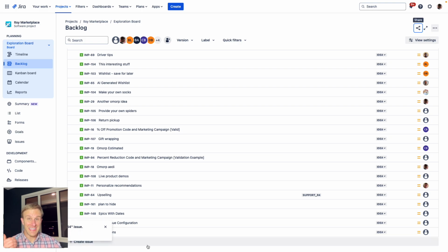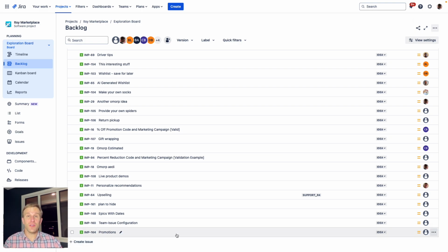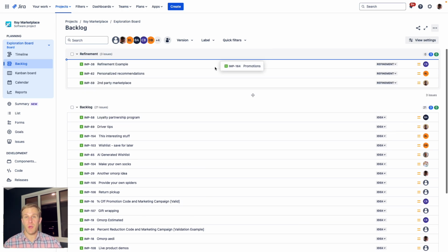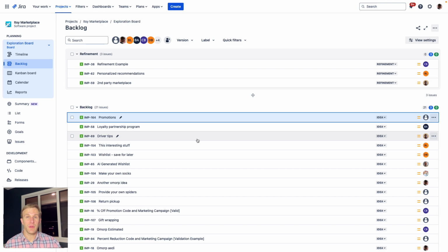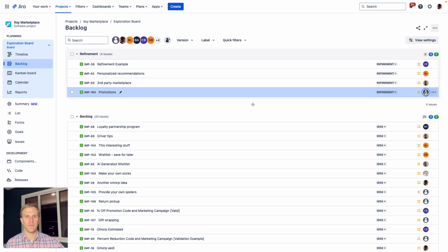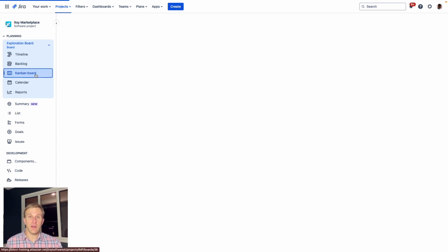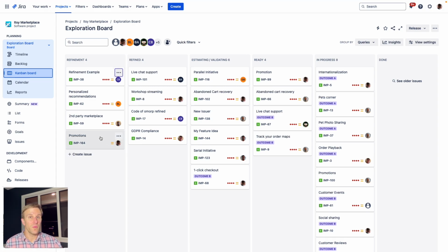Now that we've added our own idea, the list of ideas has grown even longer. It's important to prioritize it. Let's say we decided promotions is at the top of the list. I can prioritize it by dragging it to the top. Now, when someone has capacity to evaluate this idea, in this case myself, I can move it to refinement and assign myself, letting everyone know I'm on it. By moving an initiative from the idea backlog to refinement, the initiative now shows up in the Kanban view. Here, we can see where every initiative is in the exploration and delivery process.